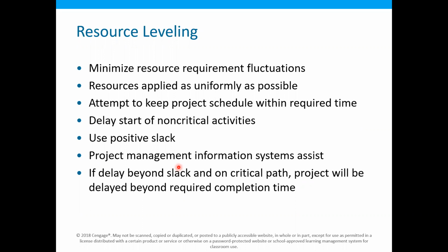However, for more complicated situations, when there are several activities and several resources working on certain activities, project management information systems, such as Microsoft Project software, can assist us with this task. And if delayed beyond the slack on the critical path, the project will be delayed beyond the required completion time.